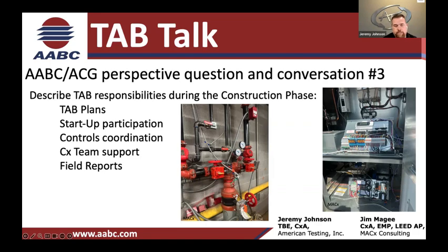If you can establish that potential on a building and you can phase balance it, you can be very successful in overcoming challenges of TAB and commissioning with that approach. Because doing it step by step and doing it in the order as you would want to do it, sometimes I don't want to say it's impossible, but it's very challenging.